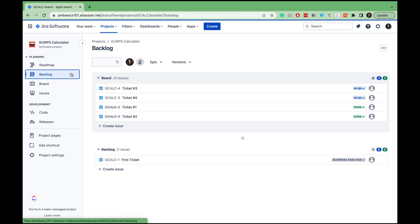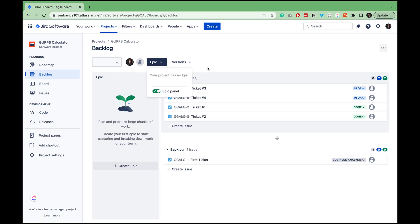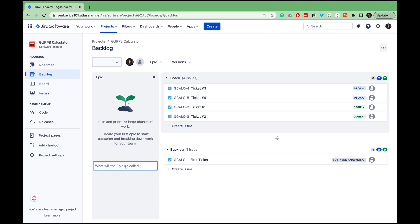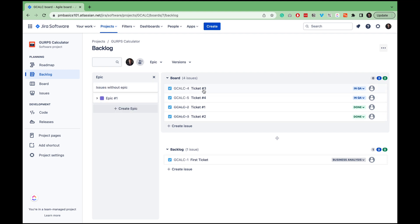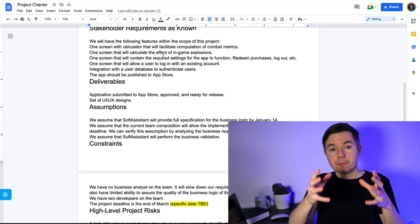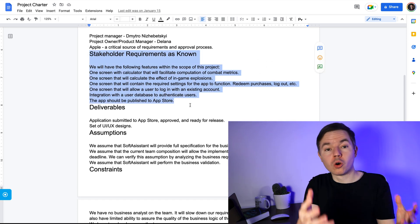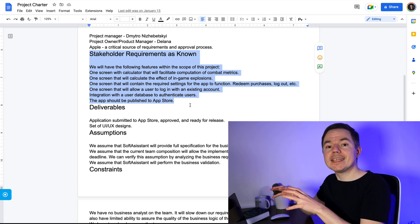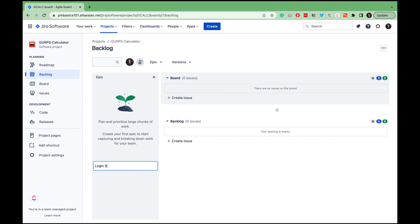I see another annoying issue we need to fix right away. First, we need an additional level of organization to control the project scope. Second, we want to group tickets by stakeholder requirements — that's why we need epics. But by default, epics are hidden from the backlog, and you need to go to each separate task to link it to an epic. That's why we need to go to the backlog and click the epic dropdown and turn on the epic panel. As a result, your epics will appear in a separate sidebar, and now you can easily link your tasks to epics by drag and drop. In the previous video we created a project charter and outlined some stakeholder requirements. So let's fill out our backlog with these epics. I like to organize features in the backlog as the user will experience them in the current release. So for example, the first one is the login screen.